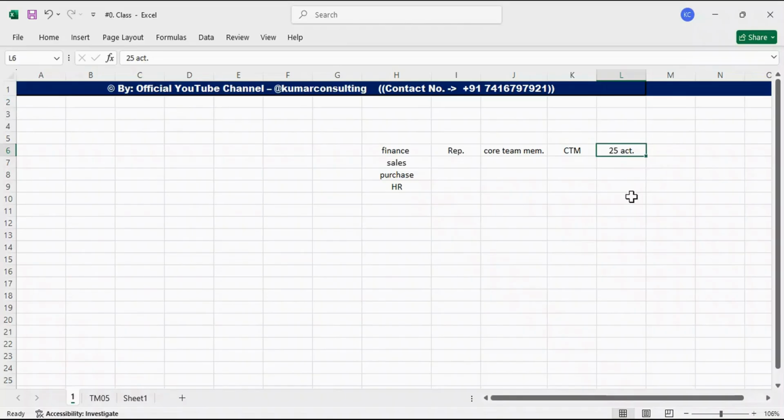So it means now the requirement is logged. Logged in the sense that no more further requirements will be accepted from our side, isn't it? So once the requirement is, we can say, frozen. We have specified whatever discussions happened with the core team member. We have prepared a document, and there we've specified that these are the things which are going to be delivered. And then finally signature and everything is done. And then after, what will happen, guys? We can start the configurations.